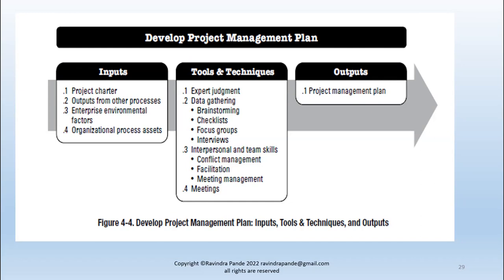Similarly, a project manager builds a checklist on his or her own to make sure, whenever he starts a project on a given day, that all resources are present and we are on track with yesterday's tasks. Now these checklists have been replaced with the Scrum Meet. In the Scrum Meet, I check all the backlogs, the activity completed yesterday, the activity planned for today, the activity to be started today and completed tomorrow or after tomorrow, and so on and so forth.